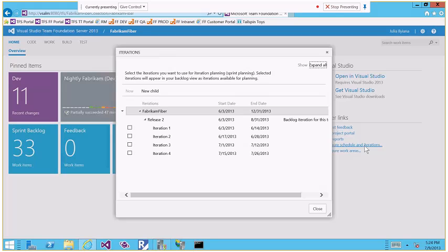You can plan when the releases are going to be, like the release schedule: release 1, release 2, release 3, release 4, and inside every release you will have different iterations. Iterations can be weekly, like one iteration per week, one every 2 weeks, or every 4 weeks. Usually when you use Agile or Scrum methodologies, you put a maximum of 4 weeks per iteration, because this is the kind of framework that Agile is meant for.